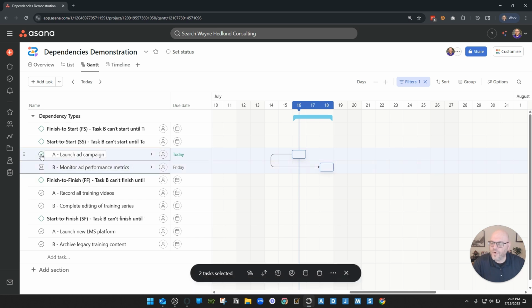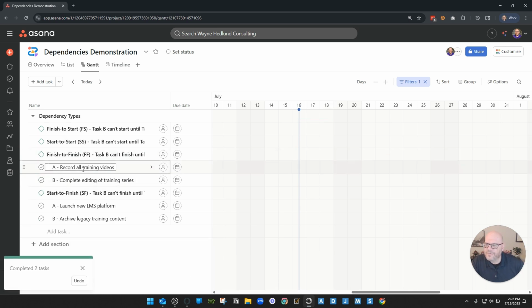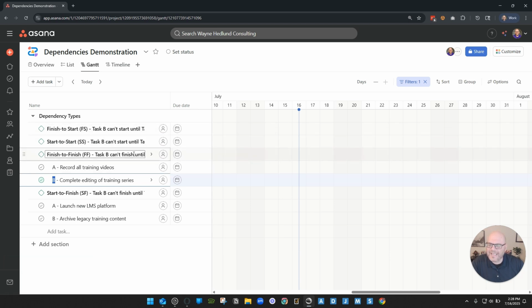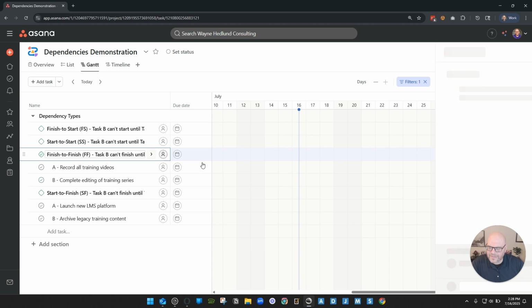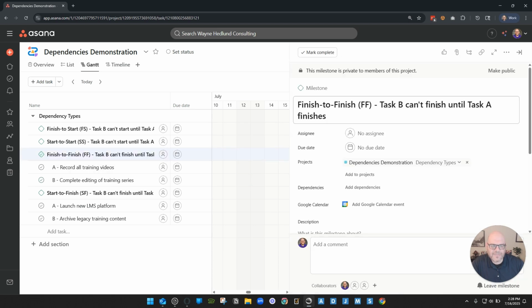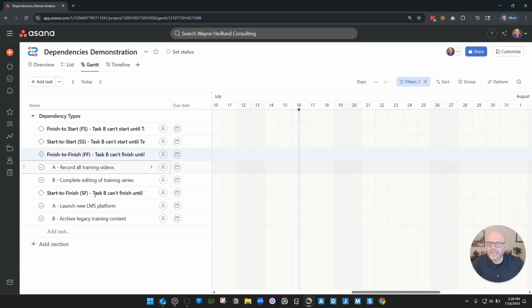Let's go ahead and mark those as complete. The next one we have is finish to finish, right? So finish to finish means, as you can imagine, task B right here cannot finish until task A has been completed. Task B can't finish until task A is finished. So I can't complete editing all my video series until I've finished recording all of my video series.